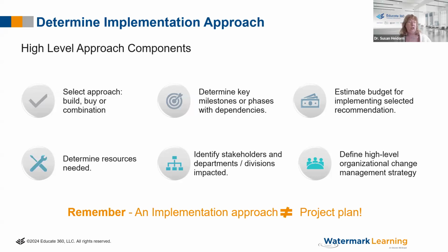I always like to make sure that when I'm looking at scope, what's in and out, not only software components in and out or processes in and out, but also stakeholders in and out. So I know which stakeholders are going to be impacted, which are not, or which ones we're going to do this for. Maybe it's not everyone, even if they're impacted.